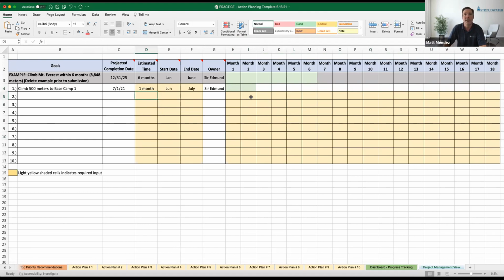And what I want to illustrate is the idea of goals, sequencing, and projects butting up to one another. In your planning, you may find that you've built out a lot of different plans, and when you sit down and define when this work will cascade over time, you might realize very quickly as you build this visual tool out, it's just a Gantt chart, that we are potentially setting ourselves up to be overextended because we've got a number of things coming in around the same time. And we want to stagger this work out.